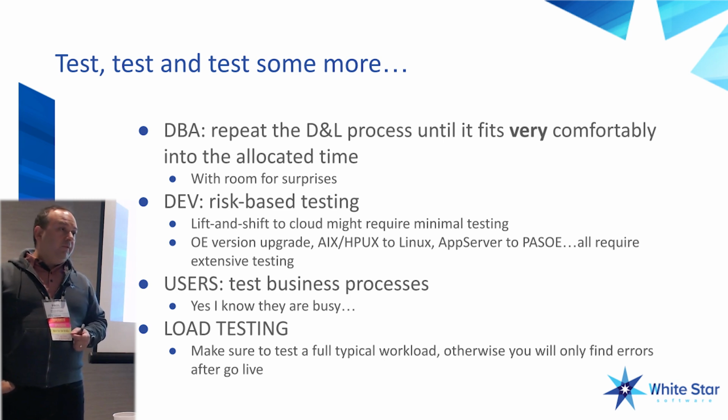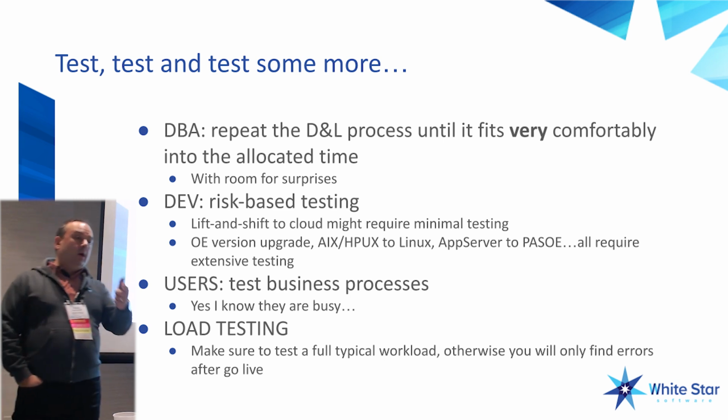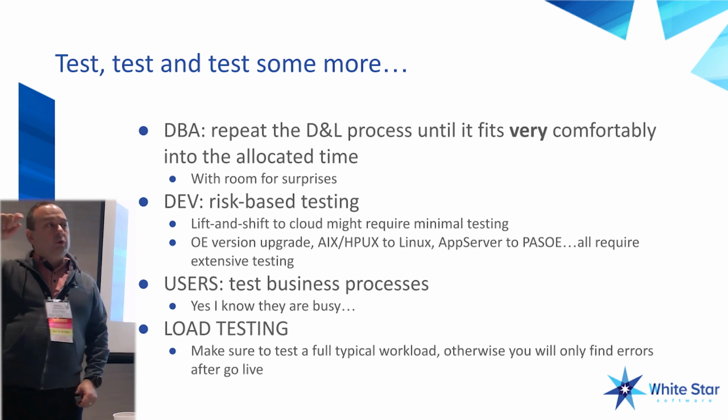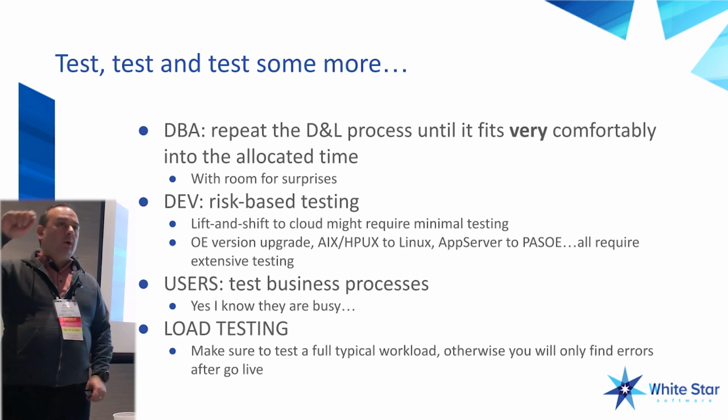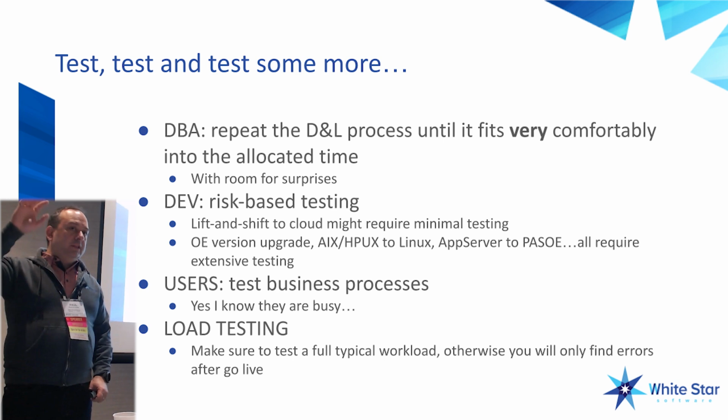All of the steps should be very well documented. Who does what steps? In our case at White Star, we have a dump and load Google sheet that's shared among all the participants, and then whoever's doing a step will actually go and change the status of the step to in progress, so you know who's doing what dump, who's doing what load, who's doing what other part of the migration process. So if it's more than one person, we don't trip on each other's toes.